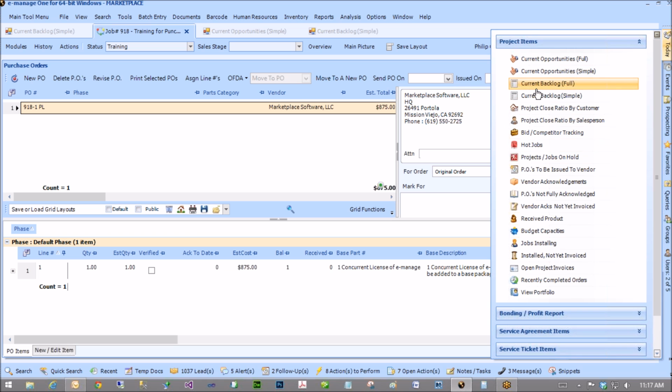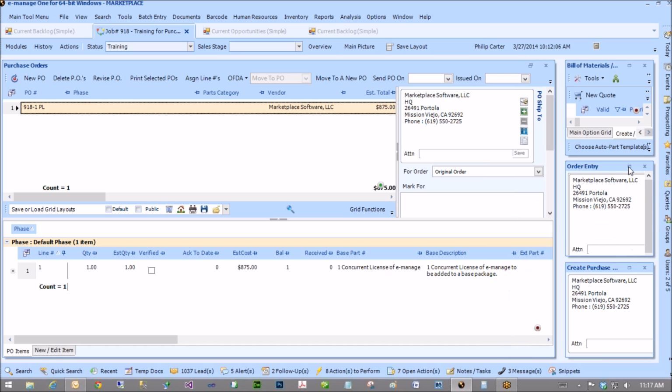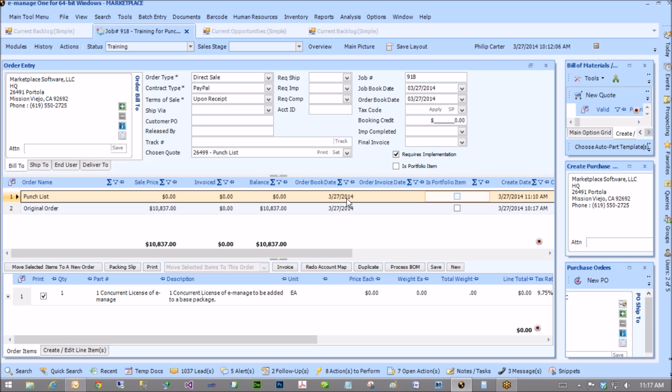We're all muted. So the other thing I was going to talk about is, Chris, sometimes you bill back the vendor, right? Because it's their mistake, right? Yes. Okay. So if you are going to bill the vendor for that, and you make that quote inside of your project and you don't give it 100% customer discount, you can change your bill to on this to be your vendor, and then you can bill your vendor for that.